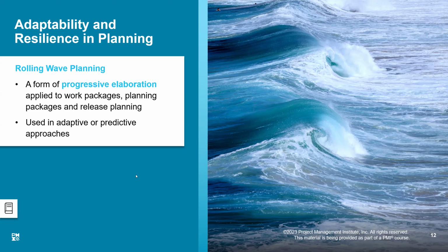So when we have dug the first 2 kilometers and we have been revealed with more facts and figures, we can elaborate the next phase of 2 kilometers in a bit more detail. That is what is called progressive elaboration. We are planning in chunks. Because my tunnel is 10 kilometers long, every phase is 2 kilometers. So whatever my estimate for the first phase is, I can simply multiply it by 5, and I have a fair estimate that this tunnel might cost this much. Based on that, I got my budget.